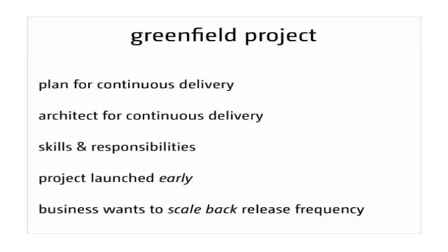That seems like it should be a hard sell, spending a quarter of your capacity working on this kind of work rather than on features. But what it meant is the project was able to launch early because we were able to have conversations, we were able to find the risks in the technical delivery early on, we were able to find risks in the requirements early on, we were able to have discussions with the stakeholders early on, and so what that meant is that all the risky stuff was done a lot earlier on in the project, and so towards the end it became very, very predictable, and we had the system ready, or the team had the system ready.